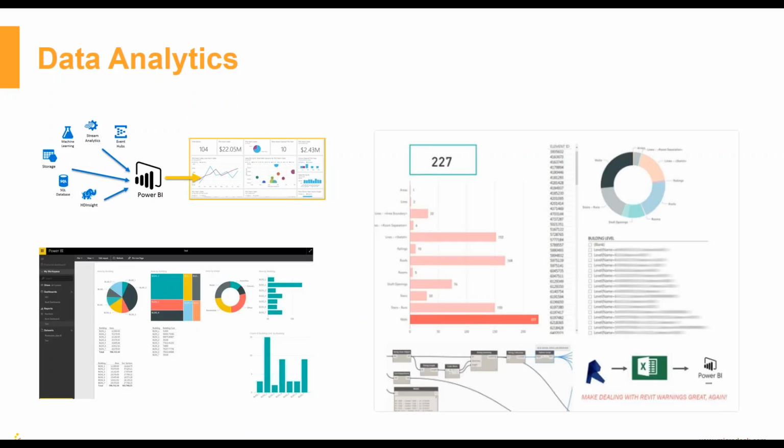How many things have been added to the model this week? When I initially set this project up, I did a quick cartoon set, or I looked at other examples, and I figured, okay, we're going to have 60 sheets. How many sheets do we currently have? How many do we expect? What's the percentage of time being spent on these?